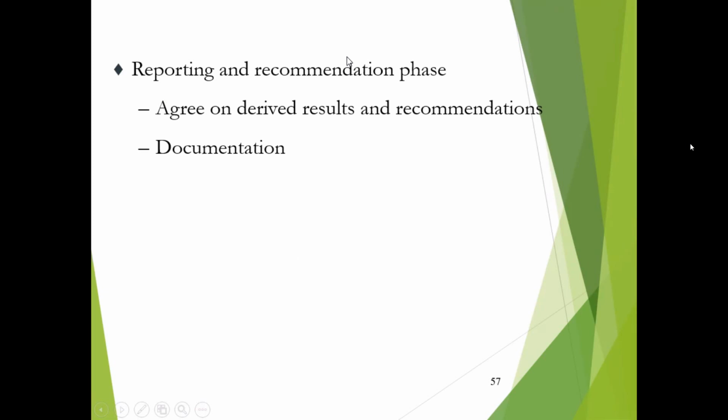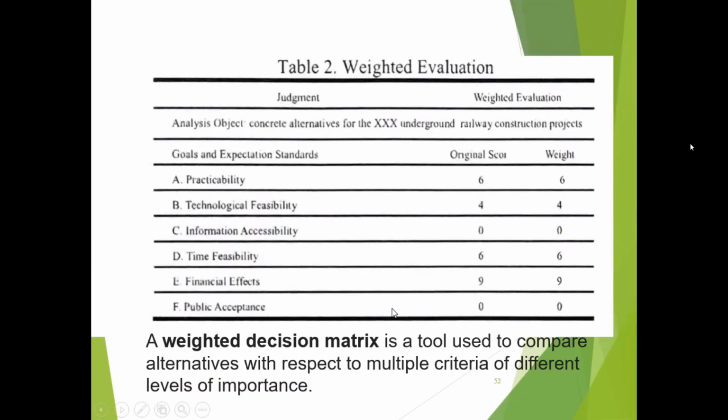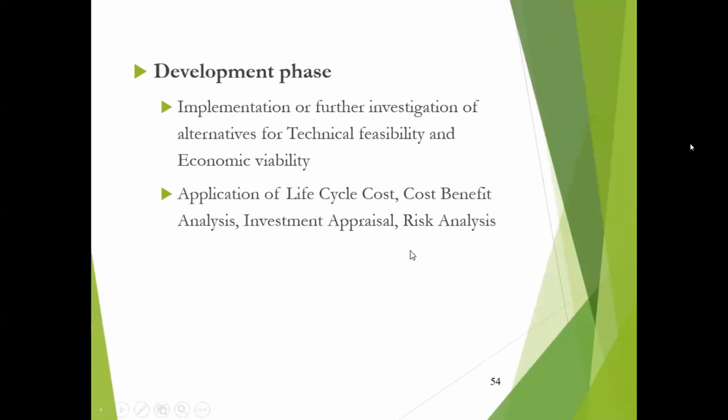Okay, so the final stage is reporting. So why costing? Where is the costing? So after this, in the development phase, further development, we do a very in-depth evaluation, right? So how do we do that? Either using life cycle cost techniques or cost benefit analysis or investment appraisal technique or risk analysis, right?